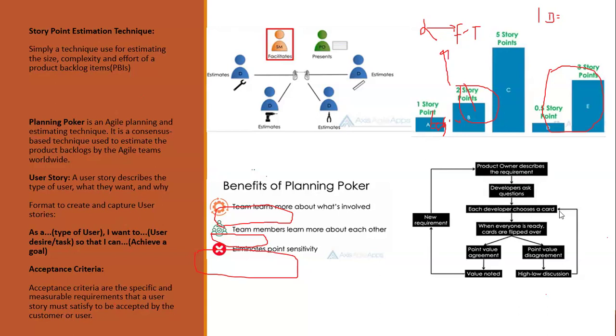So what they do, each developer selects a card, right? There are so many ways they can do this planning poker. If you open planning poker, you can see a lot of templates there. If you're working in an office space, your company may likely have cards, like some people use cards with words, some people use t-shirts. In t-shirts, you have small, extra large, extra small, large, medium, and all that. I just illustrated it here. This one we can say is extra small, then this one small, and maybe extra large: extra small, small, large, medium, and extra large, something like this, right?